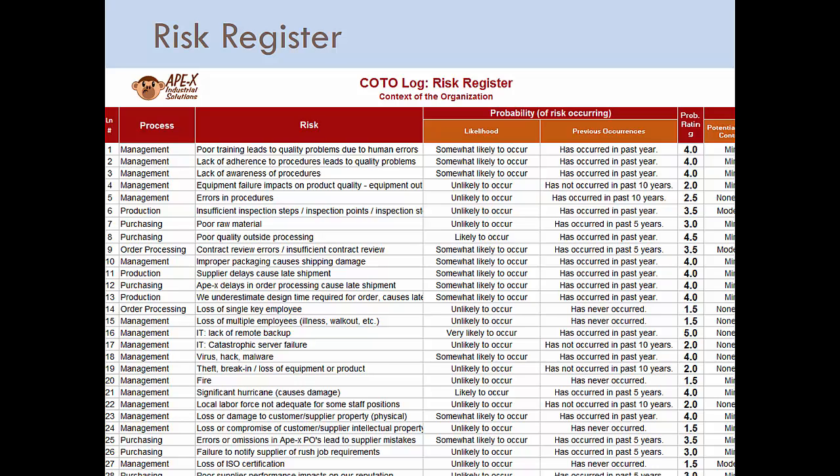Only some will. This is my version of an FMEA of sorts, created trying to reduce the subjectivity of an FMEA into something that can resemble mathematics and science. Keep in mind, all of these things are terrible. This one is probably a little bit less terrible than the others, but it will help you prioritize, and that's ultimately what a risk register is designed to do, to prioritize. Moving left to right, we see again, I've got a column here for process. I like to put that in there. You can take that out if you don't want it, but I like to maybe assign it, and that might help you decide which process owner is going to manage this particular line entry.